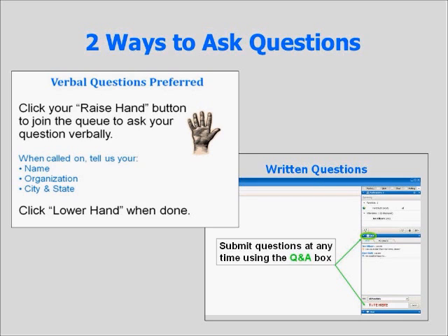Yeah, I was going the way Stan was thinking too. I think you could do this with a contractor. I think you could do it with a developer, and I think that the way that you have to set it up is through the developer agreement, which transfers the lot at some agreed upon price that's probably below its actual value, with the requirement that the developer pass that savings along to the buyer at the end of the transaction.